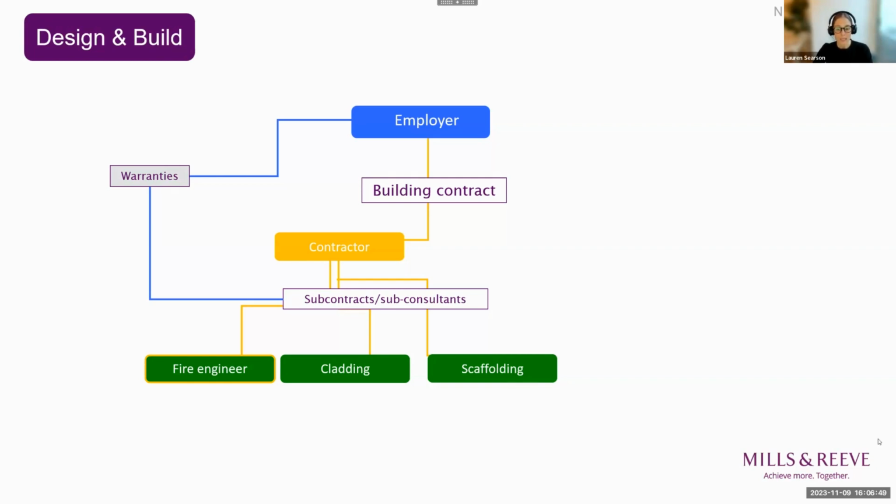Some of the main reasons why clients may find this attractive and wish to go down the D&B procurement route is that this tends to be more efficient and cost effective. If done properly, and as mentioned earlier, there is a single point of responsibility for clients. One company takes accountability for the ownership of the entire project. There's maybe a greater opportunity for value engineering, and the client obtains the benefit of the contractor's experience during the design stage. And lastly, quality and continuity of design. Research has shown that a D&B contract is now the preferred route for fit-out projects worth less than £5 million.